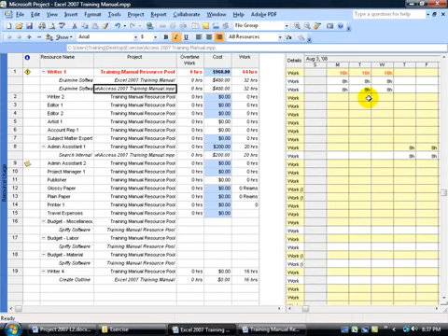But when you do that, it bumps it out, and you don't know where it bumps it out until you actually look at your Gantt chart or over here in your resource usage sheet to find out where the hours are. So if you have to find out where project moved your task to, reassigned your task on what days, why don't you do it manually yourself? Because you have to move it to your specified days anyway, unless of course it's just too much and you'd rather not do it that way.